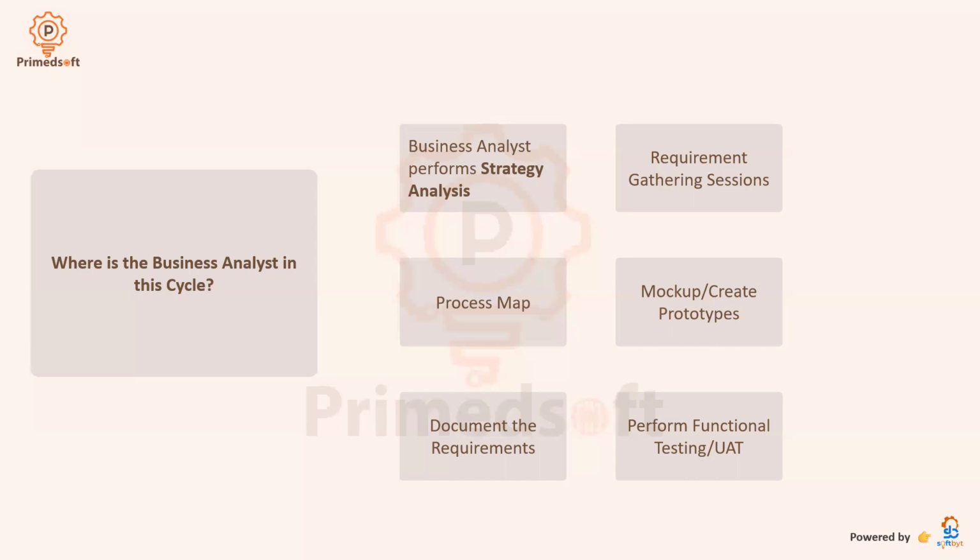It is this process map that you will then present to them. With this process map, you break down into what we call user stories and acceptance criteria. With it, you start understanding how the business works end to end, and from the beginning you start documenting the application. You start with user stories and acceptance criteria for every one of the projects.